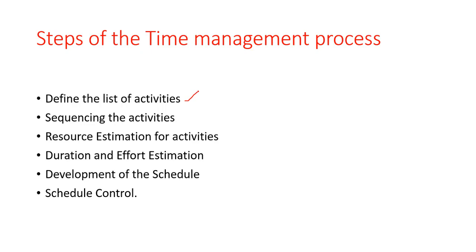Once those activities are identified, we have to arrange them in the form of a sequence. Sequence means determining which activity is to be done at the highest level and which activities are to be done at the lowest level. In addition to this, we also concentrate on the dependency of activities.